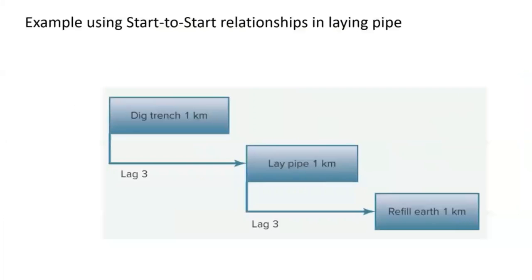Here is an example using start-to-start relationships in laying a pipe. So first we dig the trench, and there's a 3-day lag before we can start laying the pipe. And then there's another 3-day lag before we can refill the earth.